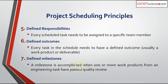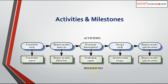Defined milestones: a milestone is accomplished when one or more work products from an engineering task have passed a quality review. For example, from the feasibility study we get the feasibility report, from requirement analysis we get the SRS document, from prototype development we get the evaluation report, and from design we get the architectural design. These are the milestones achieved at the completion of each activity.